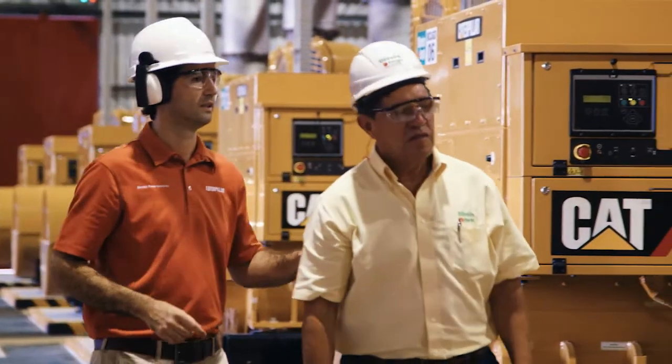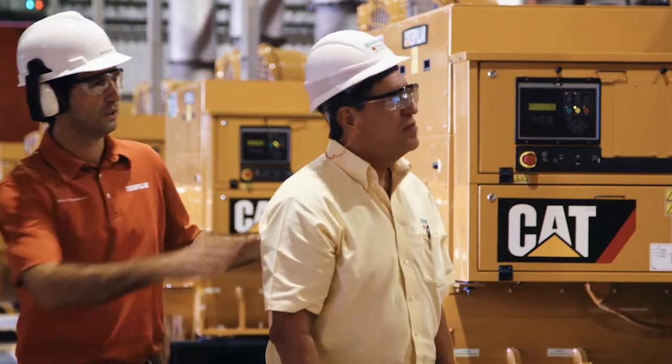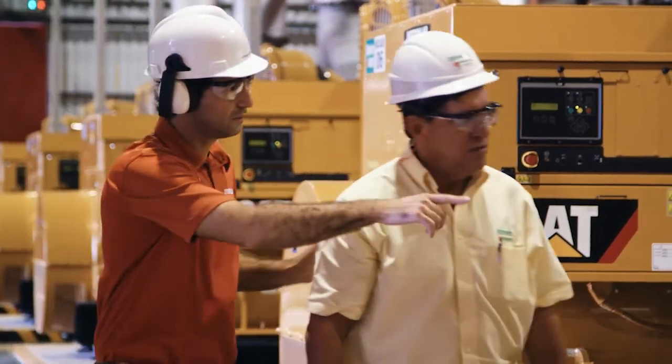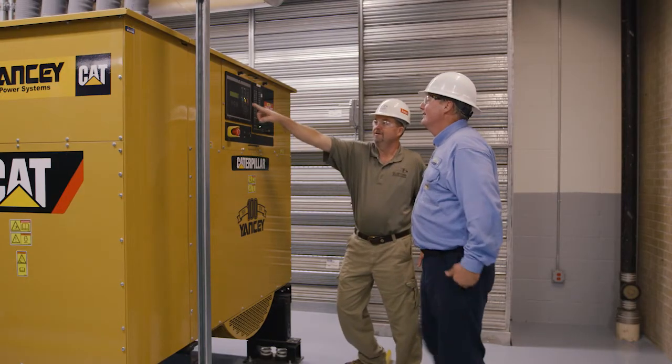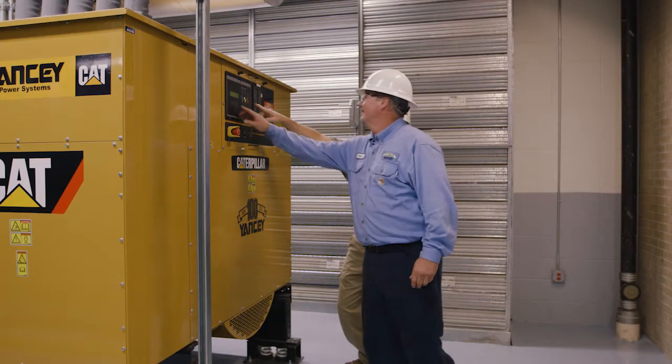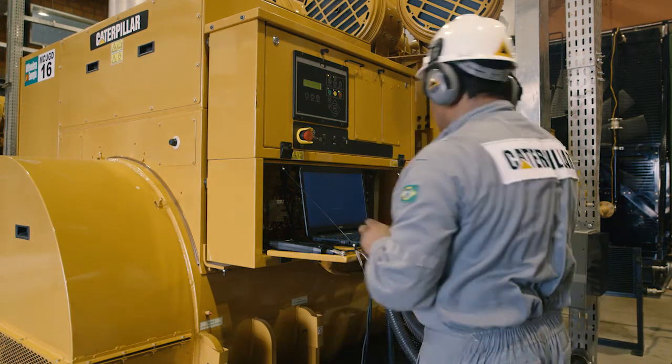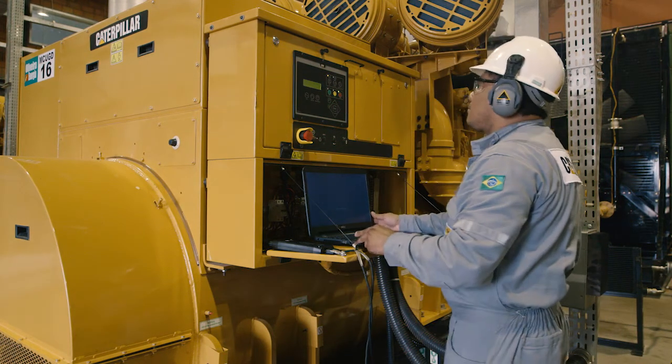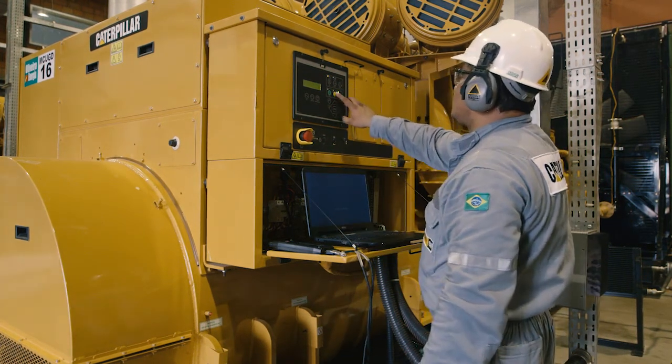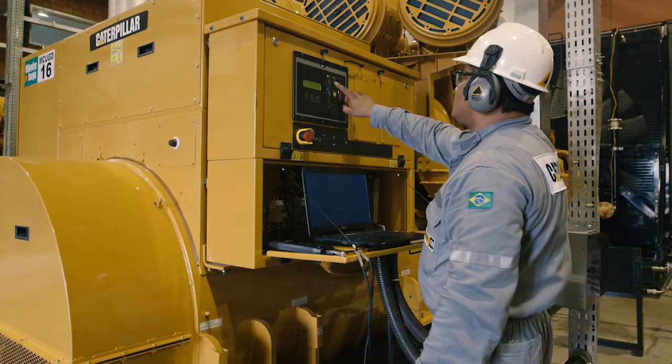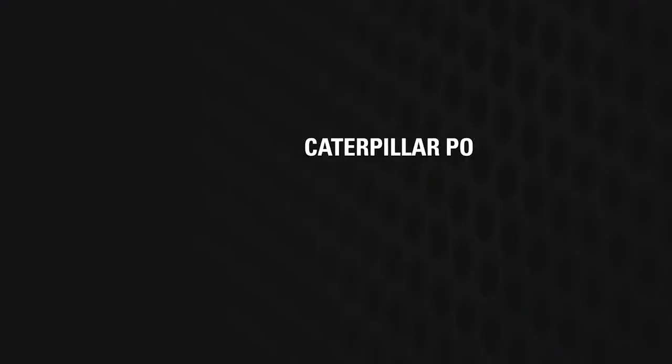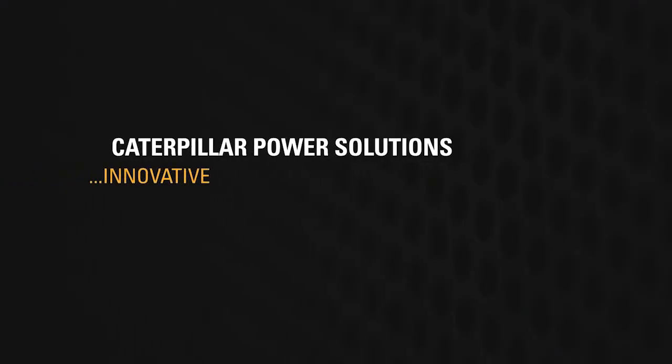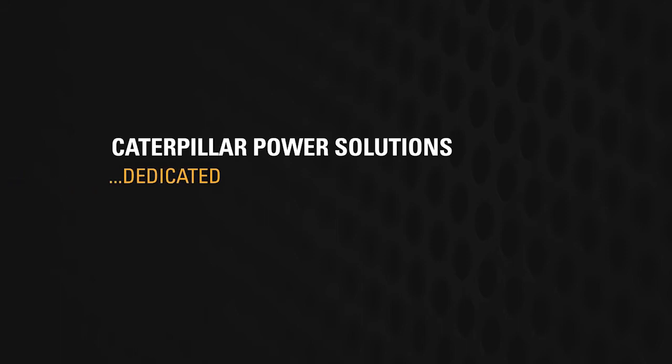Installation and commissioning is completed by our Caterpillar commissioning engineer and your local CAT dealer. On handover to your facilities management team, your dealer will provide operational training and advice on future maintenance. They can also offer a range of service and maintenance contracts to ensure optimum performance and longevity of your power solution, backed by the full Caterpillar warranty that accompanies all factory-built product.